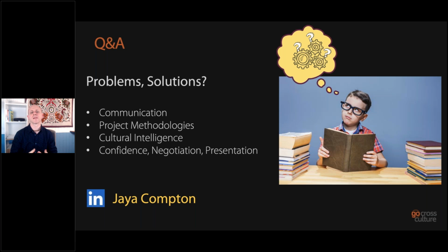So we call it something called velocity, which is how much functionality your Agile team can deliver within a sprint. And you benchmark that and you measure it each time to see whether, when you're putting user stories into the next one, you're not putting too much functionality in and you're not putting too little in. So you're keeping the performance consistent. If you start moving people around with roles, if they're not trained in that particular role as well as the other, then you'll start to get mixed performance, and then you won't be able to measure your team. A lot of this is about measuring the team's performance.